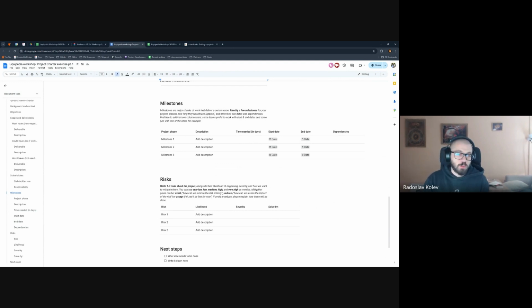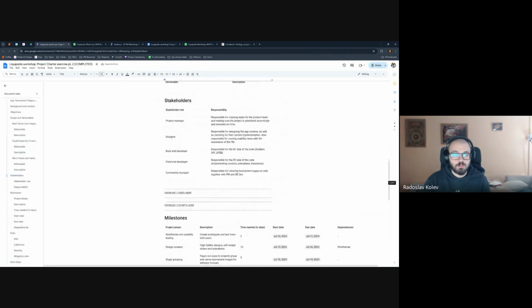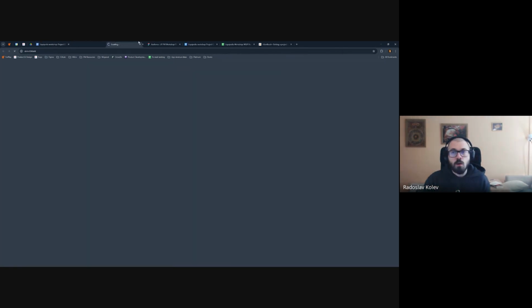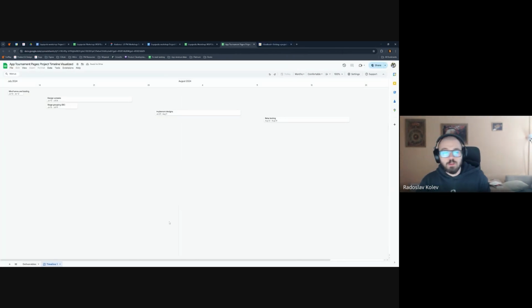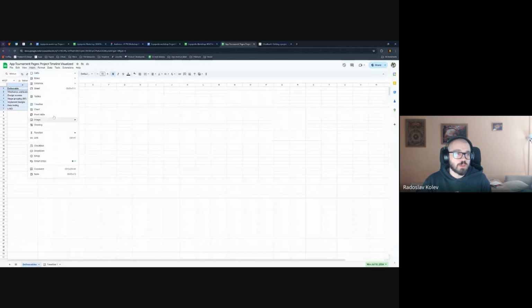I will show you an example of how I like to do it these days, but there's actually no rule for this. I like using these days the very new and dandy timeline feature for spreadsheets, which is very easy to use. Once you have your milestones, you just put deliverable, start and end date, you grab everything, and then you insert a timeline, and it will generate it automatically for you. It's the easiest way, but honestly, every other tool you want to use is fine.